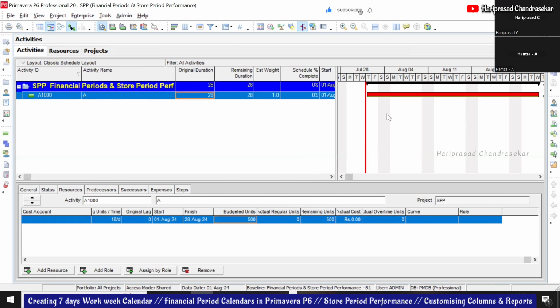Now, in real life projects, do people compare baselines? In our example we only did one baseline, but in real life projects, do people compare different baselines, or do they just stick to one? It's not comparison. If the project is not going well, they need to reframe things so that they can fix a new baseline. You should avoid creating baselines, which means too many changes in the project, because it will lead the project to be unsuccessful.